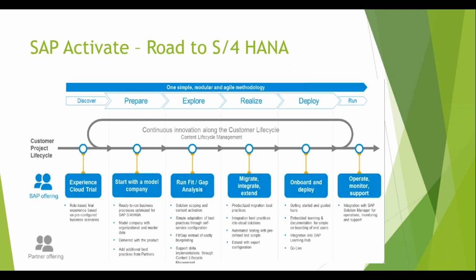So you invest around, again, it depends upon project to project, but let me take an example of a 6 months project where you invest around 1.5 months on the business blueprinting. And out of this 1.5 months, at least 1 month, you are all on paper without anything on SAP, right? All on paper means you just try to understand how they are using their current system, and the remaining 15 days you create a document in which you will tell them how exactly the same things will be handled in SAP, right? So what happens when you submit the business blueprint document to the business?